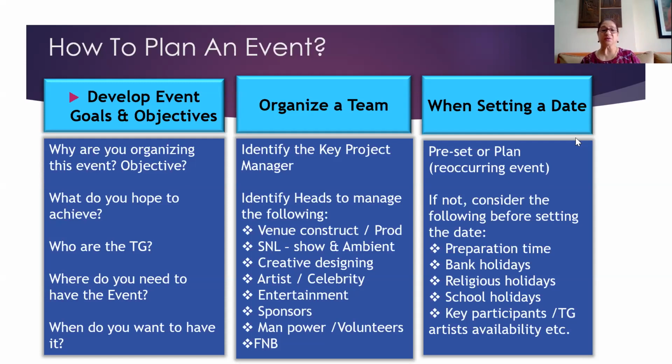Entertainment. What is your event? Who have you engaged? Is there an artist performing? Then the complete tech rider from the artist is given to the production head and the sound and light guy, so that they bring their material accordingly. Any artist you engage, you have to take their tech rider from them in terms of what do they want for the band that you have to provide, and it all has to be there ready for them before they come to set up.